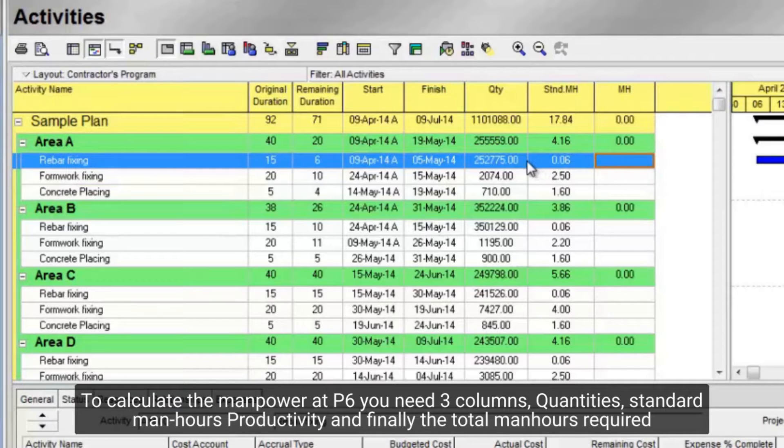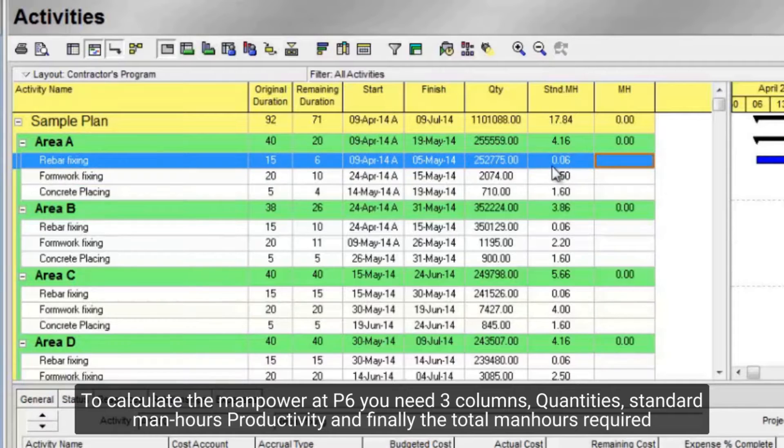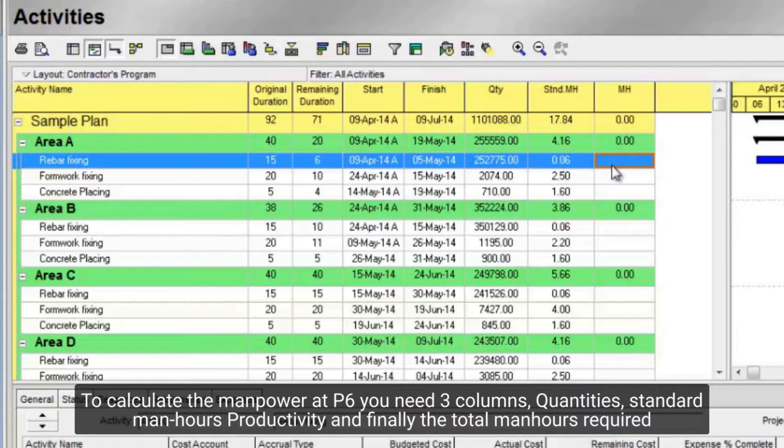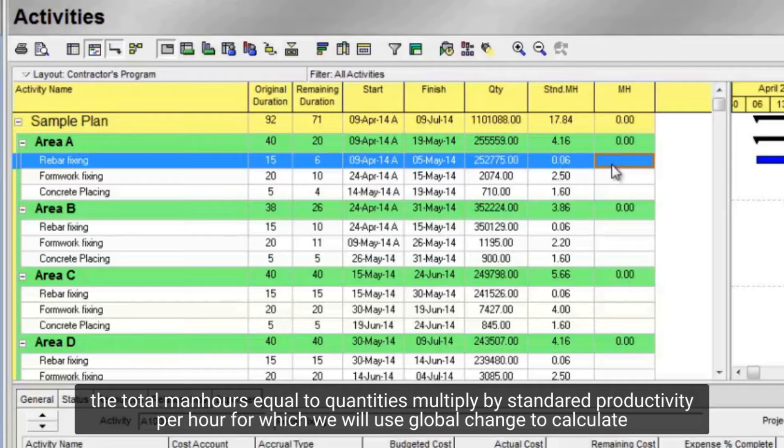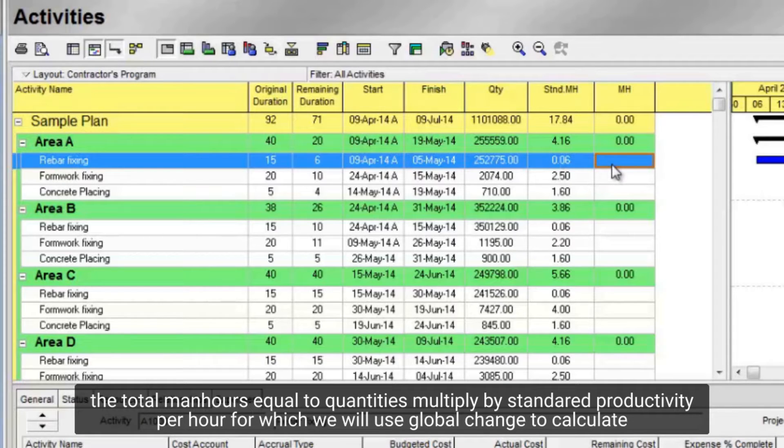To calculate the manpower at P6 you need 3 columns: quantities, standard manhours productivity, and finally the total manhours required. The total manhours equal to quantities multiplied by standard productivity per hour for which we will use global change to calculate.